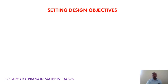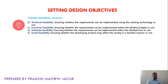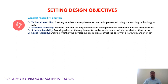Next is setting the design objectives. In this phase, we have to identify what requirements are to be implemented in the developing product. Here we first do feasibility analysis — ensuring whether we can implement all customer requirements using existing technology, allotted budget, time, etc. There are different categories: technical feasibility ensures requirements can be implemented using existing technology; economic feasibility ensures all requirements can be implemented within the allotted budget; and schedule feasibility ensures requirements can be implemented within the allotted time.